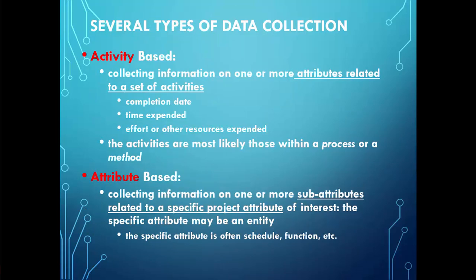The data collected could be on an activity level, which at that point is called activity-based data. The activity-based data collection will include data on one or more attributes related to a set of activities, such as activity completion date, time duration, and resources used. The activities are within a process or a method.